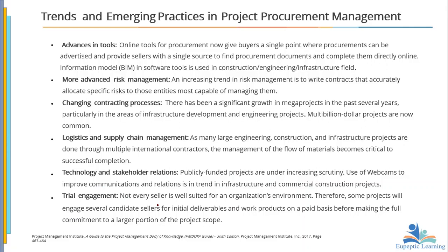Trial engagement. Not every seller is well suited for the organization, and therefore some projects will engage several candidate sellers for initial deliverables and work product on a paid basis before making the full commitment to a larger portion of the project scope. So we just put them on trial.